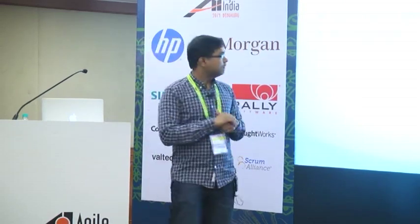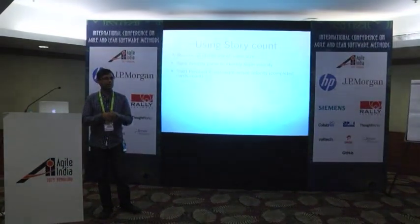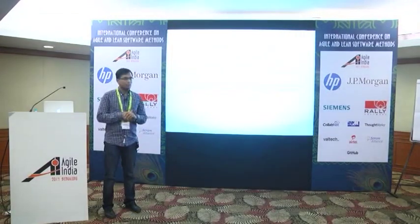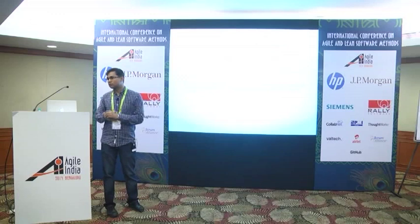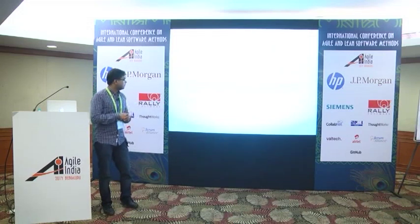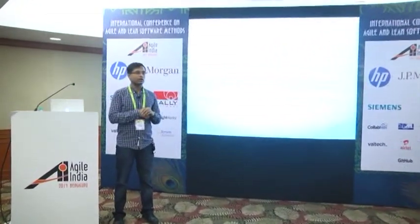We used that information and started iteration one. At the end of iteration one, we verified whether what we said in the velocity game was correct. For example, if we said we'd complete around nine cards in a one-week iteration, and at the end of week one we came in at eight to nine, we went ahead with eight story count per iteration. Using this formula, we calculated how many iterations it would take to complete the entire product backlog. We re-looked at the velocity after the second and third iterations and adjusted accordingly — similar to what you'd do with story points on any agile project.